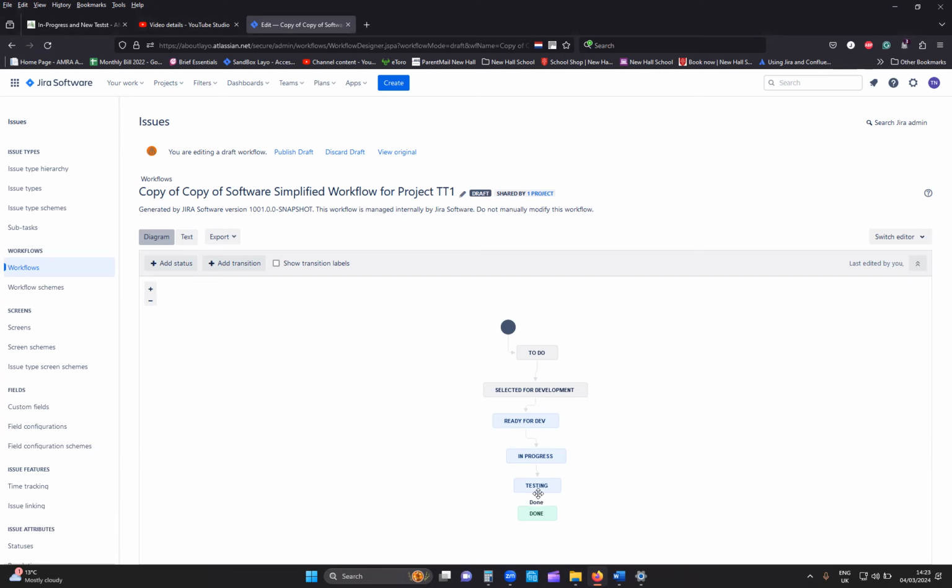It could be done, but you're demising the ticket or canceling the ticket, or it's been decided that this piece of work is no longer required, or it's been decided that this is not going to be done. You see what I mean? So it depends on what the team has decided. So you need to make sure that your resolution screen is built or configured for the purpose you would need it for, okay? So always, always, always remember, even though you have it under done status, Jira doesn't recognize it as the done status.